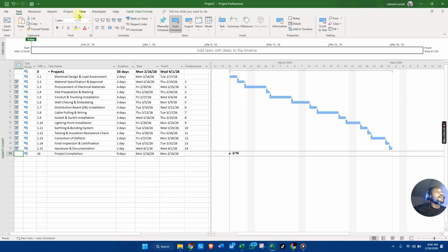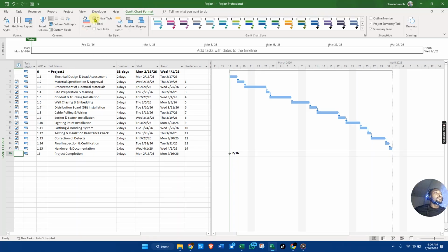We're going to look at the critical path. So we'll go to our project, then we'll look at critical tasks. Everything here is critical. We got our slack. These are our slack. What is slack? Slack, or more like a buffer time, a free time that we have. Slack can also be known as float: the time a task can be delayed without affecting the project schedule. This is like our slack. So let's remove this.